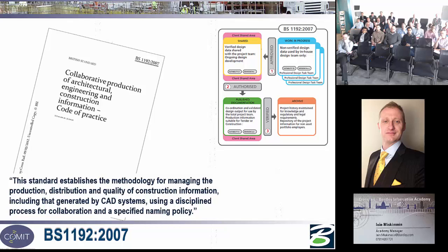Okay. So what's this fourth box for? Well, this fourth box is all the information that's generated during the project which isn't necessary for operations and maintenance. So let's say all of the wonderful 4D and 5D modelling you've done. It's very nice, but actually running the railway, I couldn't give a damn about any of that. It's just a pretty picture.